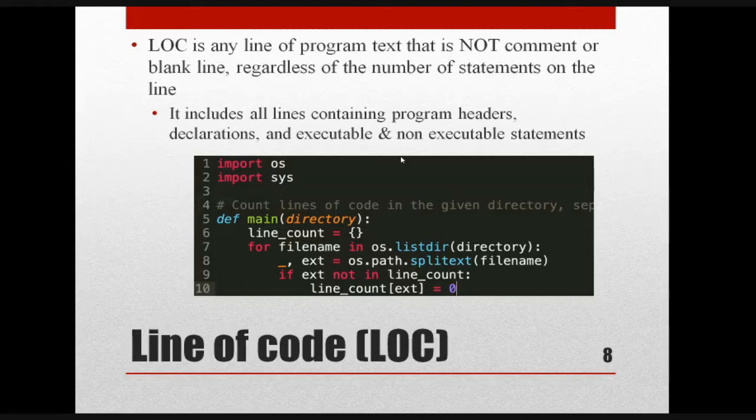So how are they calculating it? They take similar kinds of projects which are already available. For example, in most website or web application projects, we will be having a login. The login is already developed for other websites, and the same thing we are going to deploy here. So you can identify how many lines of code will be there.